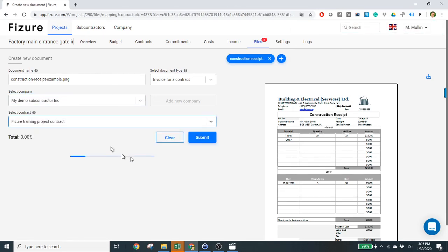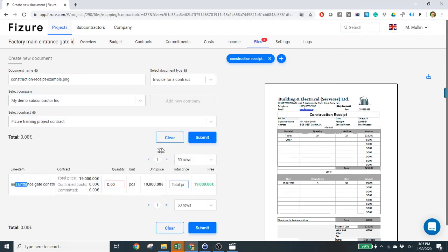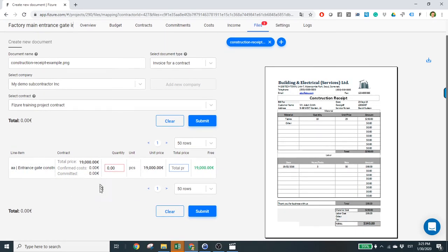When approving the invoice for a contract that has change orders, then we would additionally see the change orders listed here with the right budget item. Then it automatically updates the contract, so whenever we open the contract, we can automatically track the contract performance. Similarly, we can approve several invoices for one contract and can be sure that we do not exceed the agreed costs.